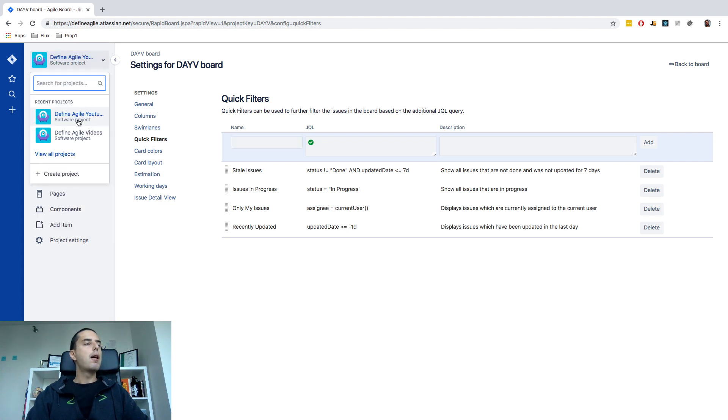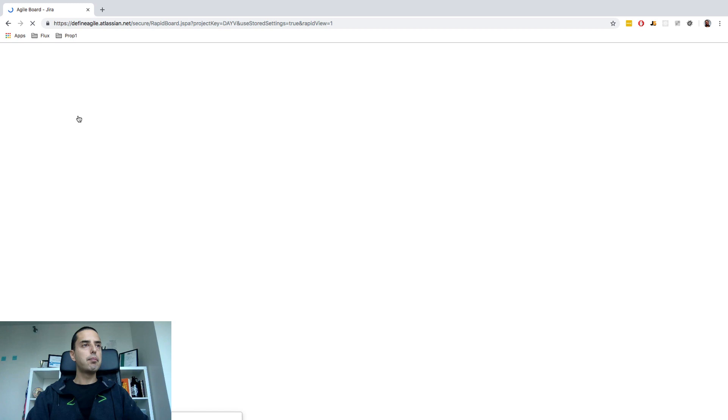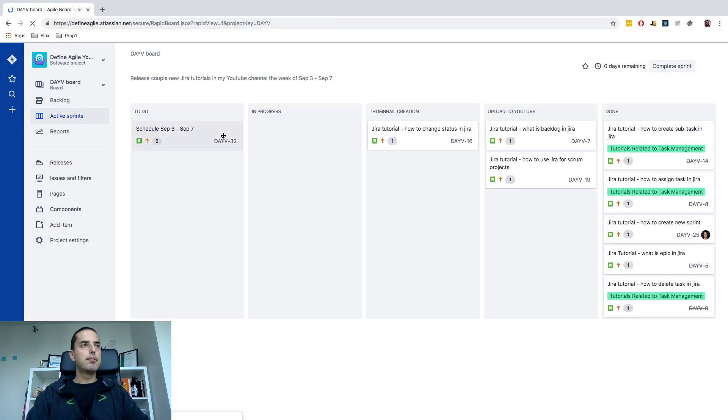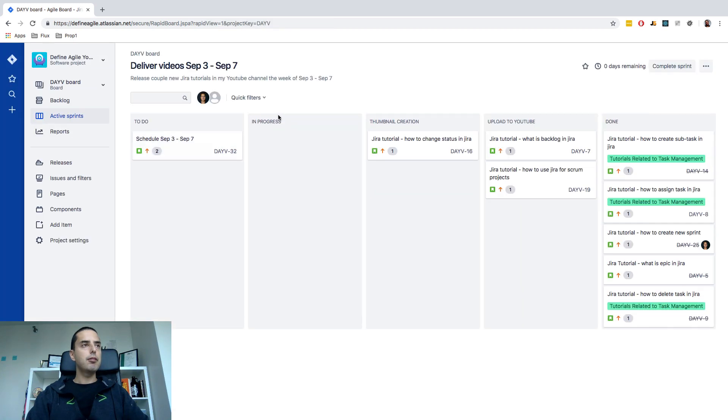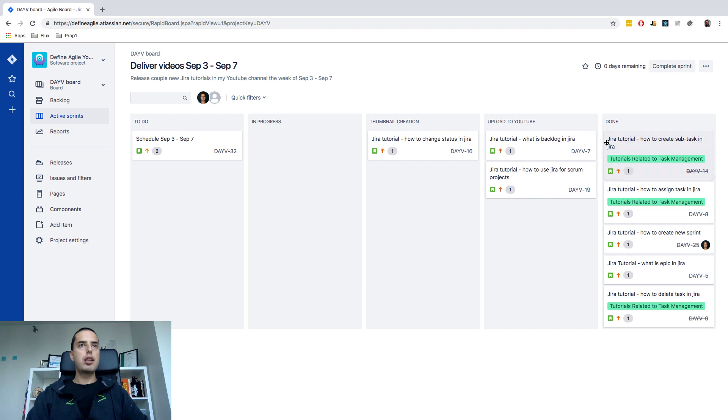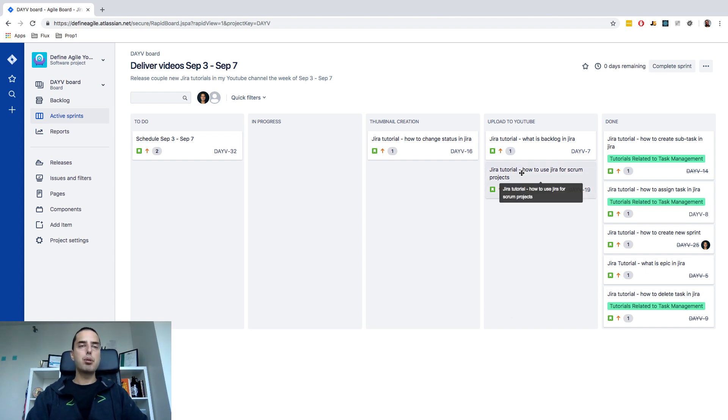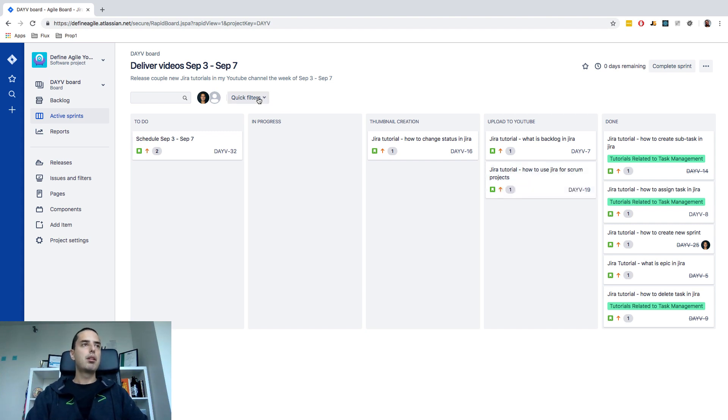We go to our project and in our project we have quick filters. We can click on it and you see we have stale issues. When we click on it done should disappear because we said not done and I know that I moved one issue from thumbnail creation to upload to YouTube so this one was updated today as well. So this should disappear. Let's check it out.